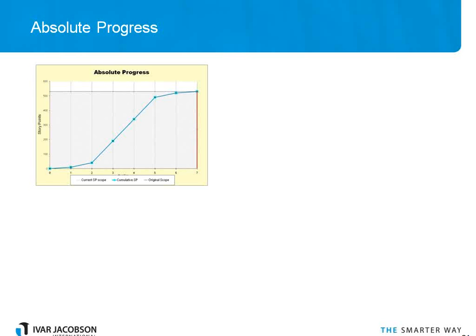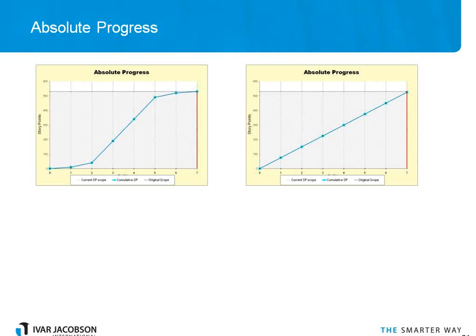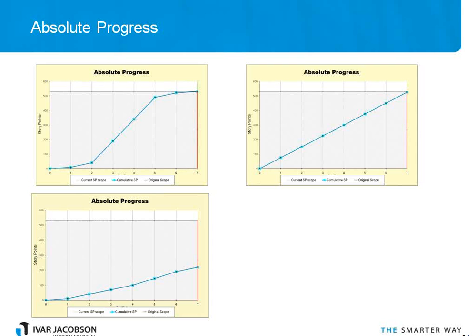So this S-curve goes with that kind of defect blip at the beginning. It's finding those underlying defects in the most risky areas of our applications that is one of the reasons that leads to this kind of S-curve. If we have lower risk and a more mature development environment, we may get the straight line. We see this in a lot of mature projects and a lot of small enhancements and things like that. It's useful for you to track progress and compare against these two curves. If I had an S-curve, will I make my target? If I had a straight line, will I make my target? Because you need to be able to recognize the bad ones.